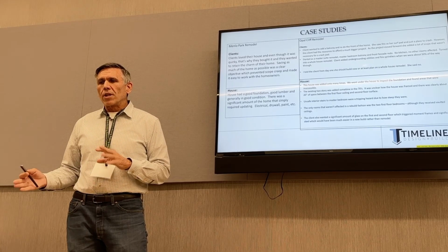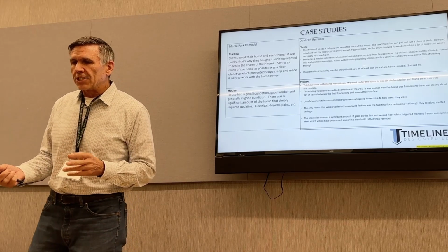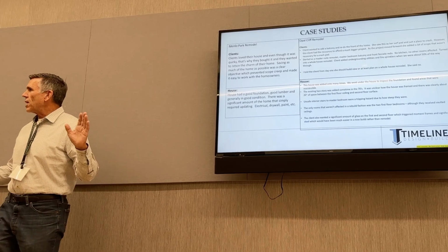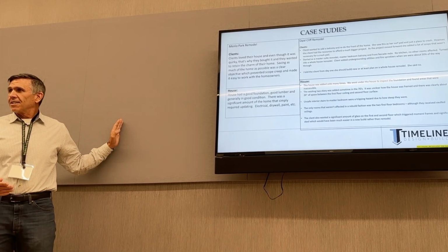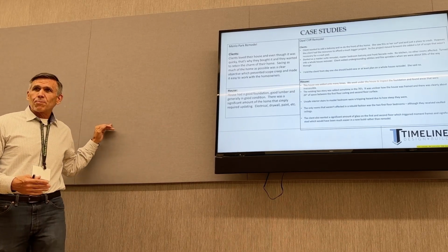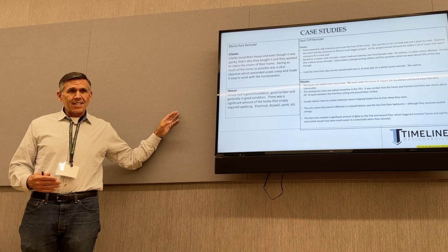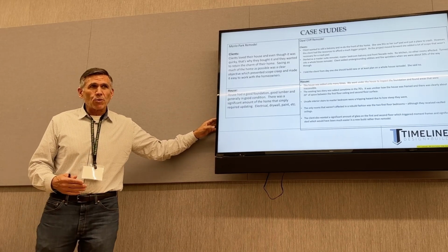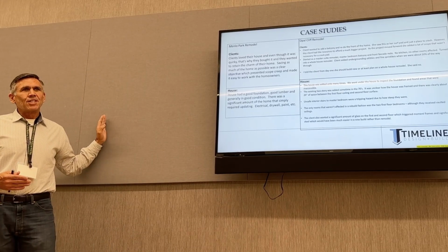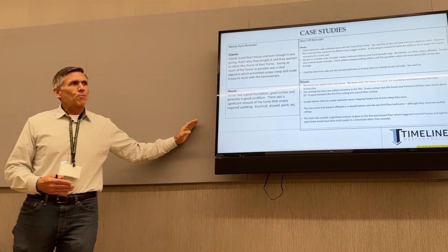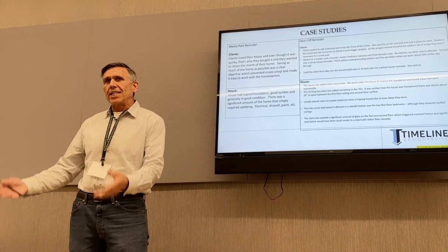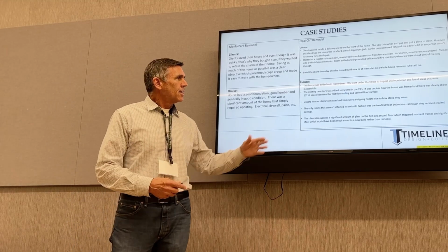And one of the things homeowners didn't realize is that the normal process of a project is you design it and then you estimate it, which is a whole big process. And then you get a change order, you do all the paperwork. And when you're building a house, that's taking away from your time to build the house. When they keep adding things in the middle of the project, it's really hard for us to get anything done, make any money, have any consistency, have a happy client.